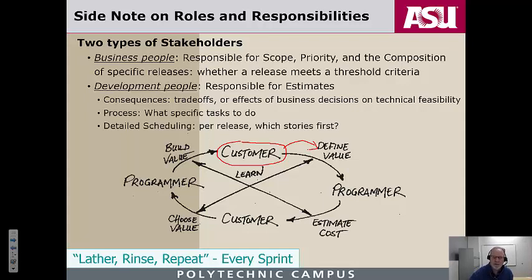When we talk about user stories next week, we'll talk about a concept called story points. We'll talk about assigning story points or business value to each requirement. So that prioritization is going to be done by the customer in terms of how valuable this feature or this thing would be to the overall product. All right, and that's how it gets to the top of the release. And again, the customer can change those priorities at any time, but at the time you sit down to do the sprint planning and finish this negotiation process, wherever the product backlog stands and the values have been assigned, that's where they stay for the purposes of sprint planning.